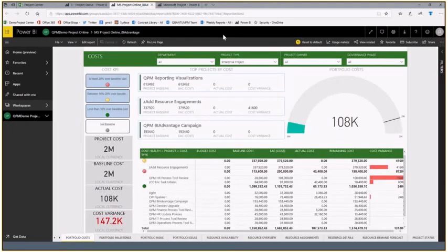On this page, this one is using that same Project Online database, but also pulling data in from other sources. So this is using BIAdvantage to get to the data. And here, just a different way to look at things again. In here, you'll see we have a ton of filtering going on, different kinds of things to look at. So I could look at only the ones here that are 20% over baseline cost, or I can rearrange it any way I want to. I might look at particular types of projects, potentially. So lots and lots of filtering.